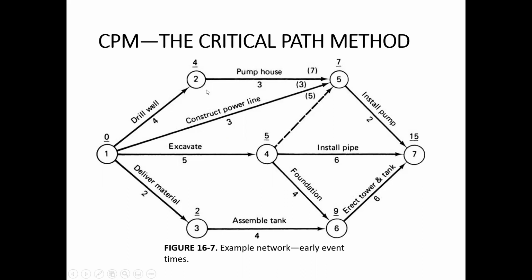Okay, so although we have calculated those event times, we can say that this activity, drill well, can start as early as the start of the project and can finish as late as 4 weeks. Similarly, for the pump house activity, we can say that this activity can start as early as the 4th week, but can finish as late as the 7th week. This is obvious because there is no freedom in this activity. It cannot start on any other day without delaying this project.